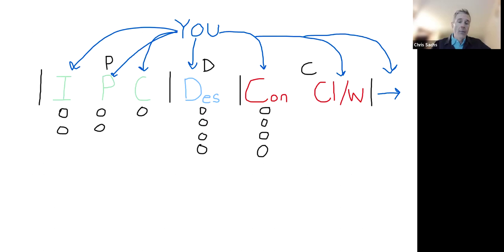closeout and warranty can start when you're in this phase here in construction, depending on equipment that you purchase, its startup date. The manufacturer of those pieces of equipment might actually have a requirement that the warranty starts when the piece of equipment is installed and first turned on. So that's important to know. And otherwise, there's times where you just want the contractor to carry liability because you're going to consider your warranty starting the day that you get turnover